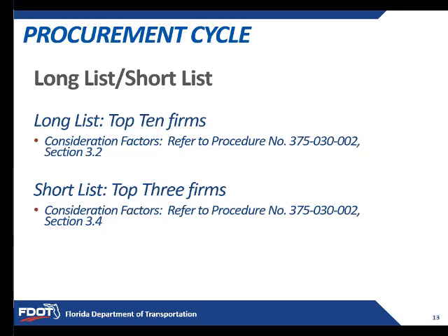Workload of each consultant, looking at the number of projects the consultant is shortlisted on and those that they have not been finally selected for. Balancing the needs of the project to the abilities of the consultants. So again, this goes back to during that marketing opportunity where they're explaining what their strengths are to you, what projects fit within their strengths.